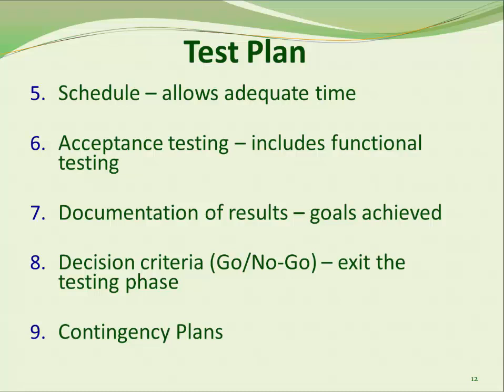In addition, the test plan should have a well-defined schedule for testing that allows adequate time to test, review results, and retest if needed. Be sure a scheduled acceptance test includes functional requirements testing, how error conditions are handled, and security testing. You will need to consider how test results will be documented, demonstrating goals achieved.